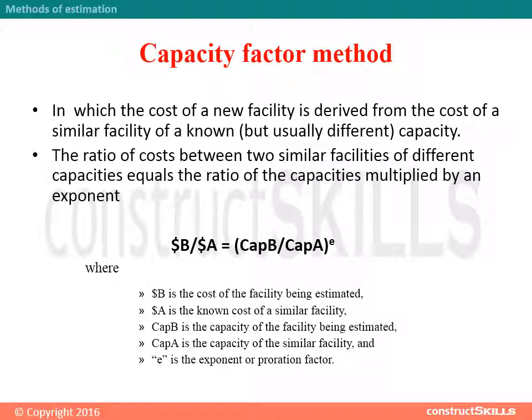A Capacity Factor estimate is one in which the cost of a new facility is derived from the cost of a similar facility of a known capacity. It relies on the nonlinear relationship between capacity and cost. In other words, the ratio of costs between two similar facilities of different capacities equals the ratio of the capacities multiplied by an exponent, as shown.